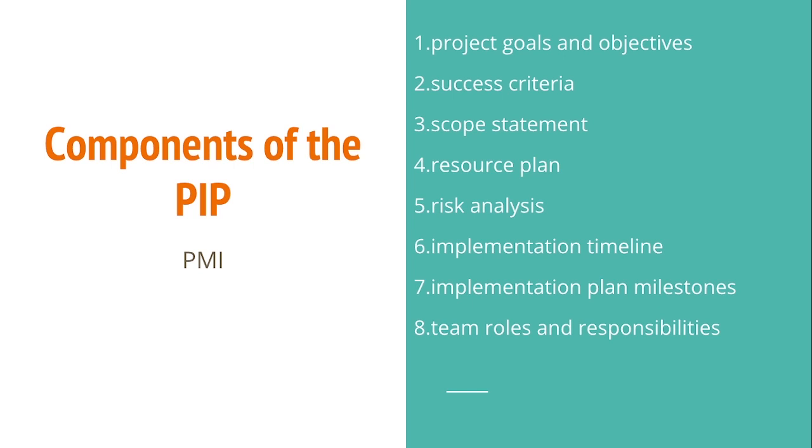Then teams and responsibilities. So here, after you assigned your activities, done your risk analysis, identified your resources, then you assign your teams the different responsibilities. Yeah, it's also called more like a work plan, where you give each team that this is going to be your responsibility and this is going to be the timeline for you to achieve this, to complete this duty. Yeah. So it's also very important for you to include it in your project implementation plan.